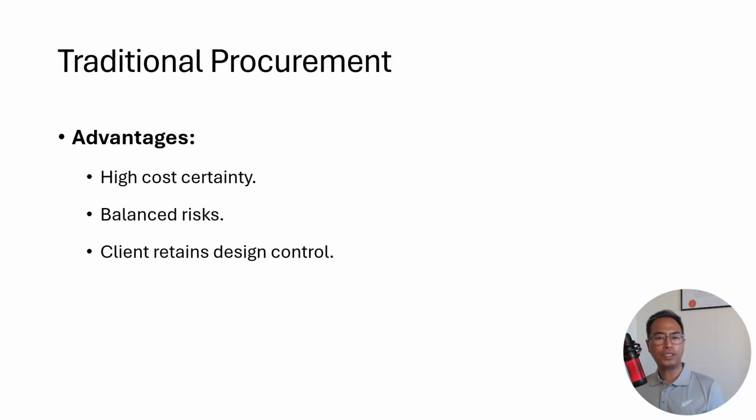The advantages of traditional procurement include high cost certainty, balanced risk, and client control over the design. This method is ideal for projects where design quality and client involvement are top priorities.